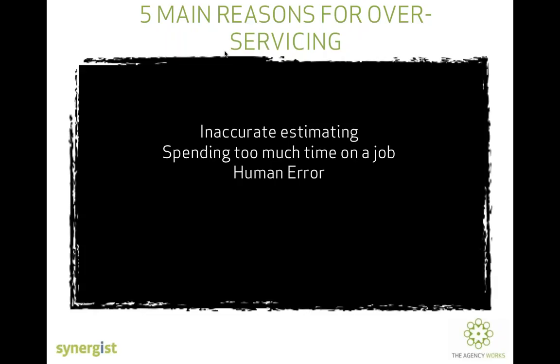But if you're estimating and recording time accurately, you'll be able to identify if it happens too much. You'll also be able to look at patterns that may be occurring, whether it's with a particular job, a particular client, or maybe a particular resource. It could be due to amendments. It will give you all of that visibility. And if you report on that, and it's with this particular client, or a particular type of job, and we keep going over on the estimate, it's because of the amendments that have been recorded that we haven't actually estimated for.